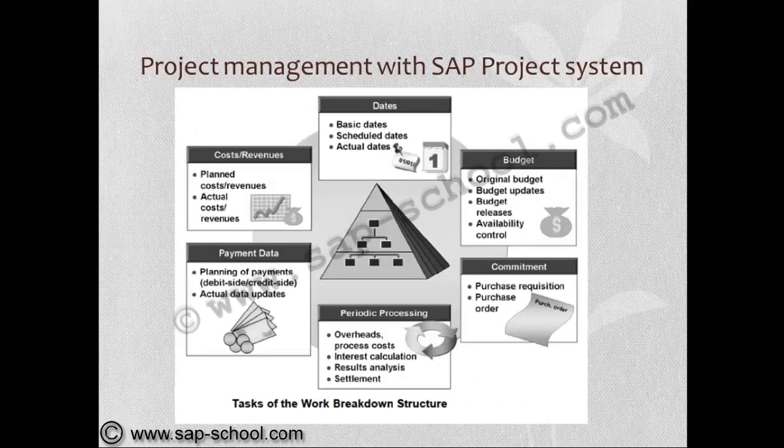The further elementary parts of SAP PS are dates, where we are using the basic dates and scheduling those dates and confirming the actual dates; budgets, the original budget and whatever updates are taking place, and budget approvals, and all the time the availability control; and the commitment through the purchase requisitions, purchase orders and payment, planning of payments, actual data updates, costs and revenues, as and when required reportings, and periodic processing.